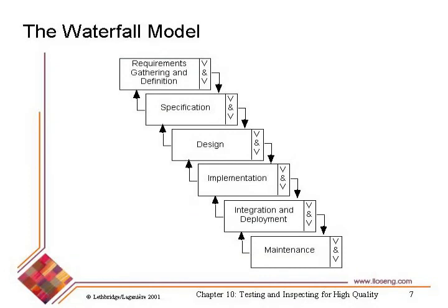You figure out the requirements first. Maybe you look at other diagrams like this and they say you do the feasibility study first or something like that. But basically, you do some upfront work that culminates in having the requirements. You might move down into a more detailed level of specification. And at each step, ideally, you're going to do verification and validation. So you're going to make sure your requirements are good. Once the requirements are good, you can do some more detailed specification. You make sure they're good, verification and validation.